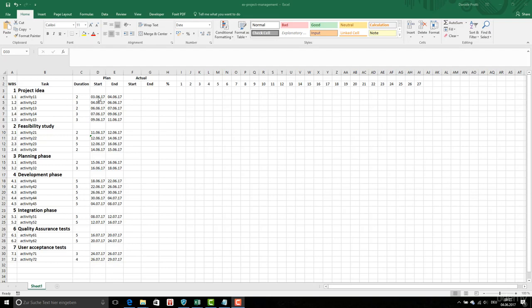Now I set up all the dates. So this one plus this duration minus 1. Okay, so 2 days and etc. This one is minus 1 and etc. for the next ones.